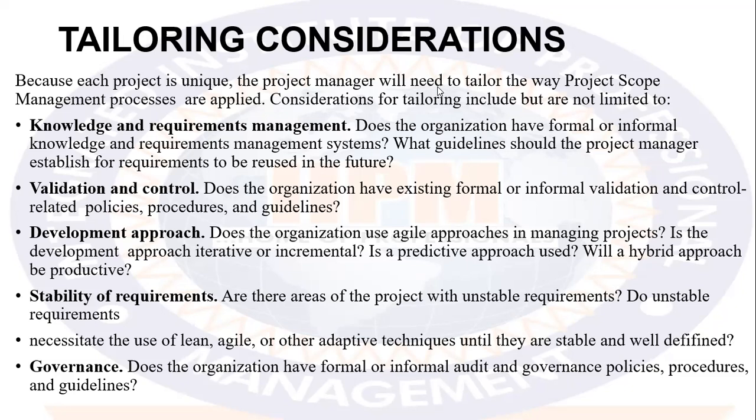For instance, if I am to do a federal government road contract in maybe Imo State, and then I'm to do another one in Kano State, the road construction might be the same, but you also understand that the tailoring considerations will differ. One, the people in Kano and the people in Imo State are not the same. So stakeholder engagement tailoring consideration will differ. Then you also have to consider that the weather in Kano and the weather in Imo State is not the same. So you have to also put tailoring consideration for that.